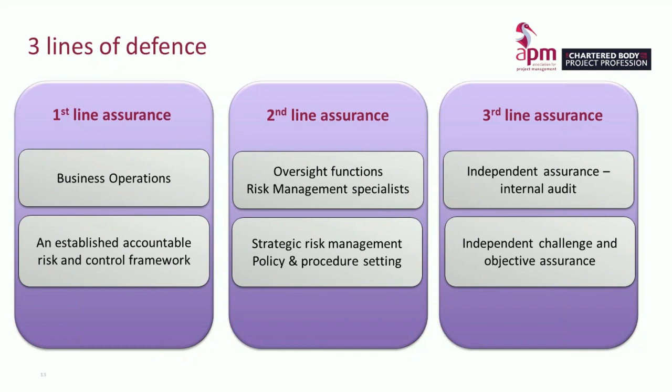The model is designed to ensure effective management of risk. The board provides direction to senior management by setting the organisation's risk appetite, and then they delegate ownership and responsibility for operating risk management and control to both the CEO and senior management. To ensure effective control of risk, senior management rely on adequate line functions, including monitoring and assurance functions, hence the 3 lines of defence. First line are the functions that own and manage risk. In project management for change risk, this will be the project team, project management office, and any first line change assurance teams.